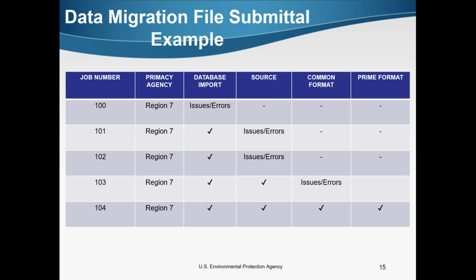Bear Brown, North Dakota. Going back to that topic, my suggestion would be, if someone's storing data outside of CIDWS now, don't deal with it as part of the migration. Migrate it in later on through the bulk data upload process. Worry about the CIDWS transition first, get that done, and then bring that in later.